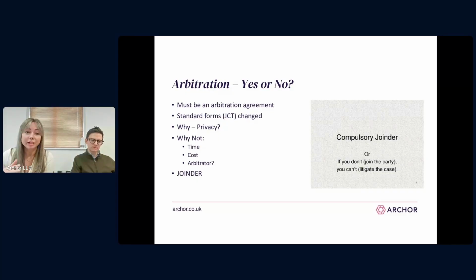If you don't specify it in the particulars, you can't then issue an arbitration if you have a dispute. Now, the main reason why arbitration is chosen over court proceedings is privacy. So arbitrations are private, court proceedings are not. So if you don't want it to be in the public domain that you're having a bust-up, arbitration is the way to do it.